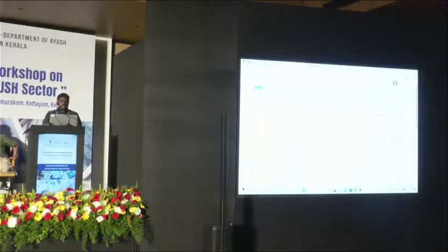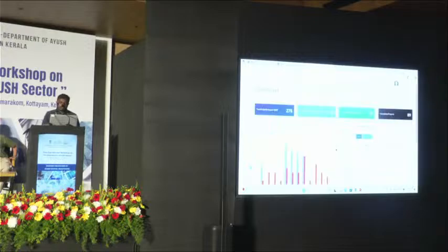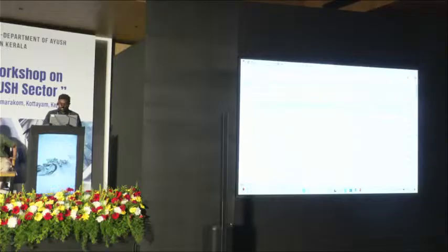After that, we have 8 checkpoints for the non-commencement to commencement stage activities. And we have a project engineer login, operated by our regional consultant engineers and the planning engineer, who update the work status for each work. Here we are showing a work, the upgradation of Government Ayurveda Hospital Thalassery, Kannur, with the engineer who handled it and who has entered the physical work status.